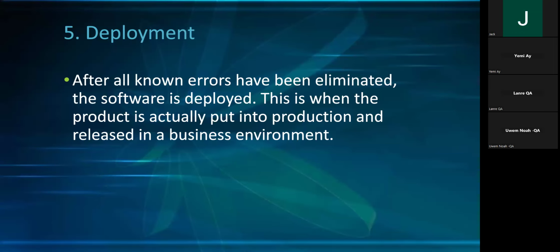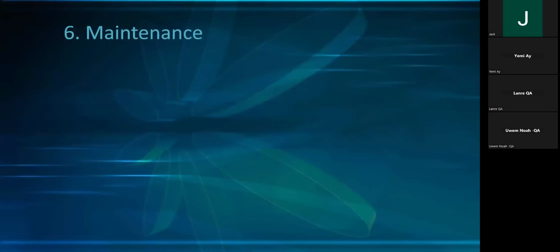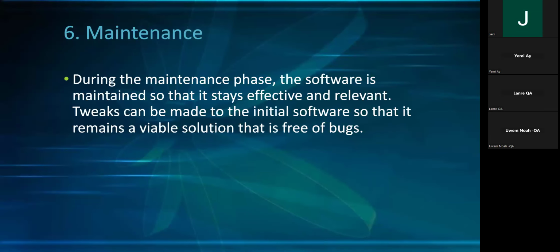If we hadn't jumped that environment in the deployment phase, we would have caught whatever would happen in UAT. If we didn't catch it there, we would catch it in pre-prod. We would know there's going to be an issue. Jumping from a lower environment to production is very risky. So that's what I want you to understand. I won't talk about environments again. I've given you the basics, the high level of it.